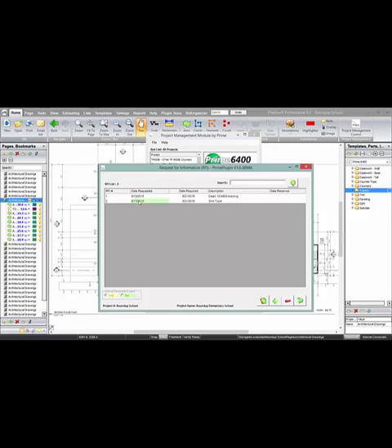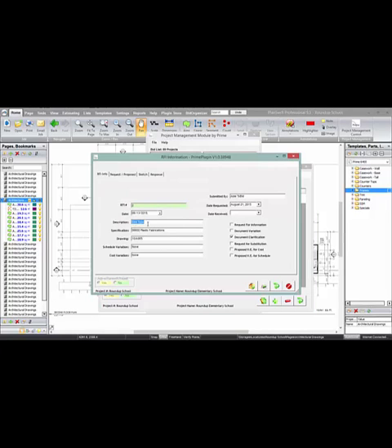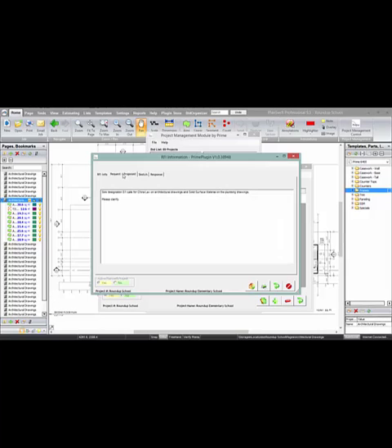We'll open an existing one and show you that in this case we're looking for a sink type clarification. We complete all the appropriate information that you see here, and then we can request what we're looking for. The sink designation is contradictory on the drawings, and we're looking for clarification as to what that might be. Again, these RFIs could be used post-bid or pre-bid in order to get this information for you and track the entire time.